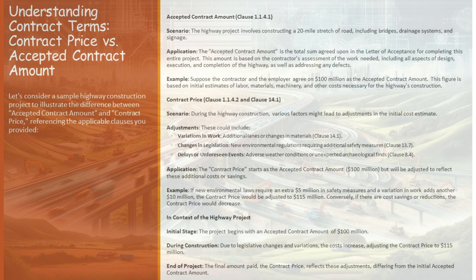This figure isn't plucked from thin air. It's meticulously calculated, considering the labor, materials, machinery, and a myriad of other factors crucial for bringing this highway to life. The accepted contract amount is the financial foundation of our project — an agreement on the cost of executing and completing the highway, including addressing any defects that might arise. This amount is a commitment, a starting point, reflecting the contractor's understanding of the project's demands.